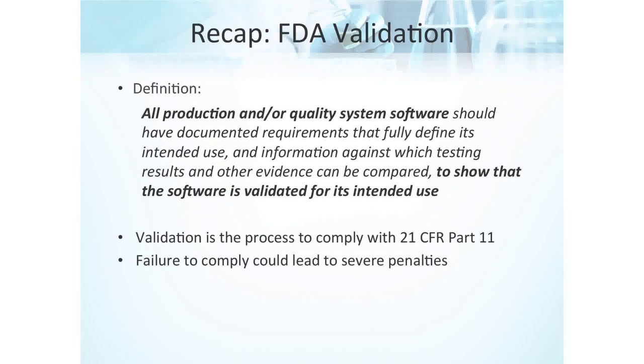And the auditors are looking for appropriate documents that are clearly written, that are using unambiguous terms and are accessible. So examples of what they're going to ask to review right out of the gate: the validation master plan document. We're actually going to go through that in some painful detail later, hopefully not too painful. Your standard operating procedures and sets of instructions, they need to be current, they need to be written, and they need to be consistently followed.